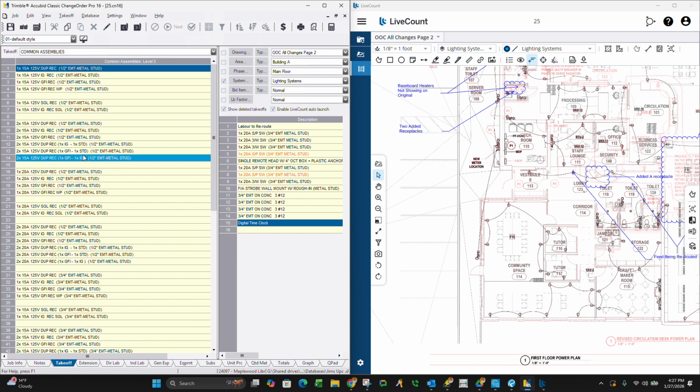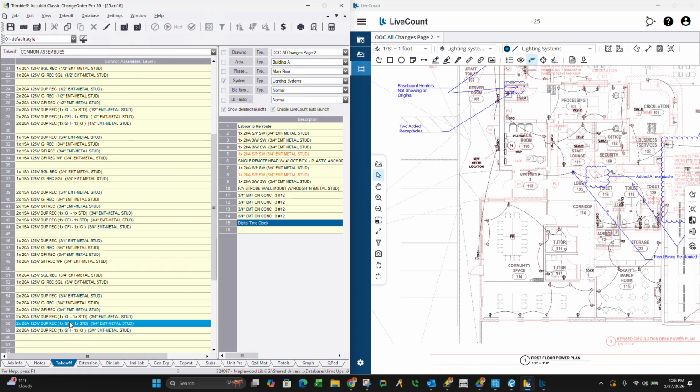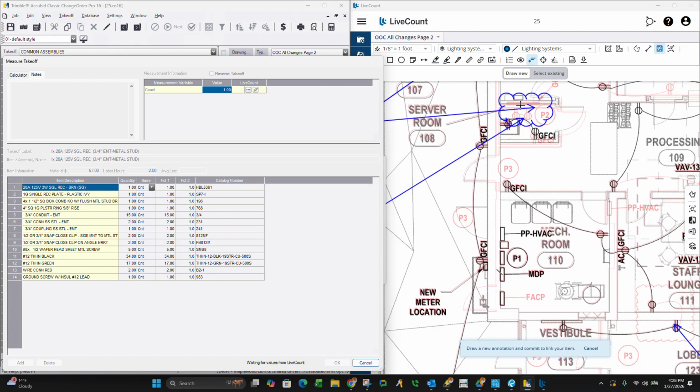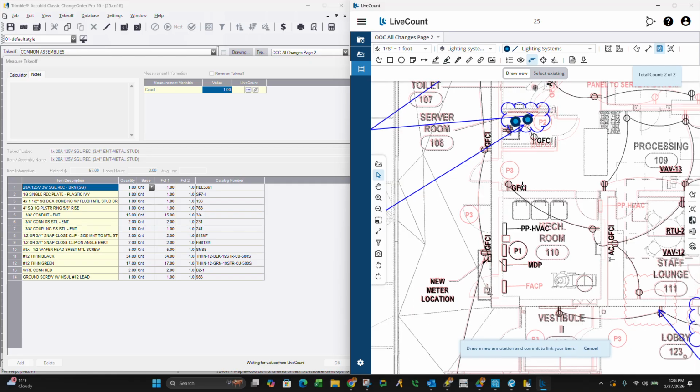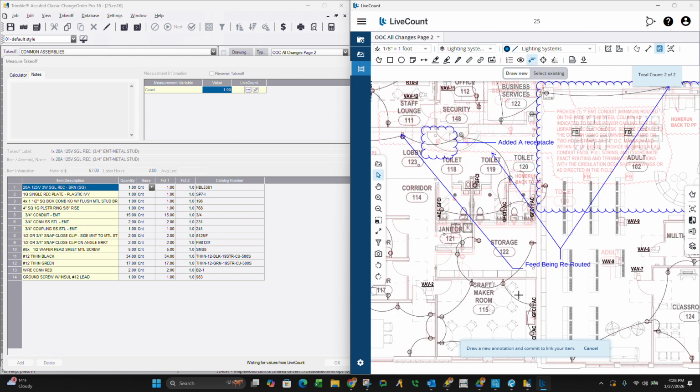We're going metal stud. If you had to go and review it and really spend your time on change orders, you'd have to go back into the architectural and see what the wall layout is going to be. It's just a pain. No one's going to fight you on metal stud. If it's masonry, mason block, the only thing you have to watch out for is if you have to cut these receptacles in. So you could specify in your notes that it's for metal stud, so that the project manager can review it.